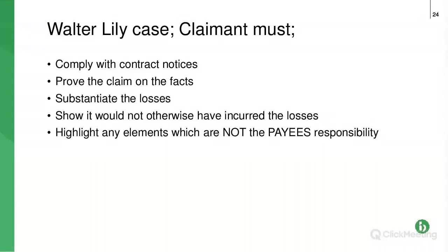But this is your key case law in terms of those notices that I've been saying are so important, and they are important. But this case gives you a little bit of leeway if you haven't quite sent formal notices out. But, and this is a big but, you have effectively informed the PM, the contract administrator, or whoever. So typically that might be an informal notification.